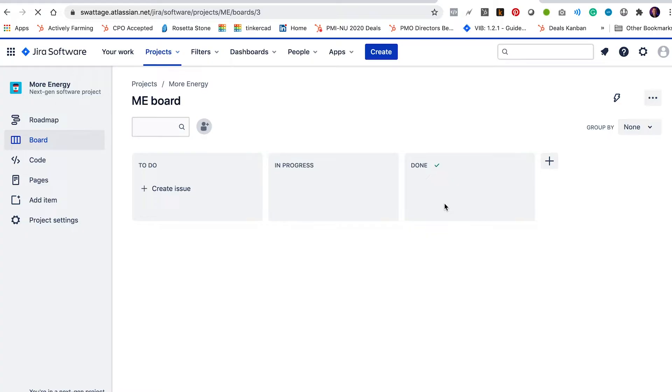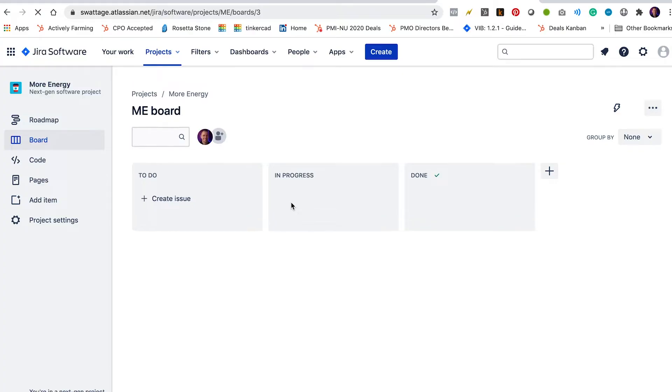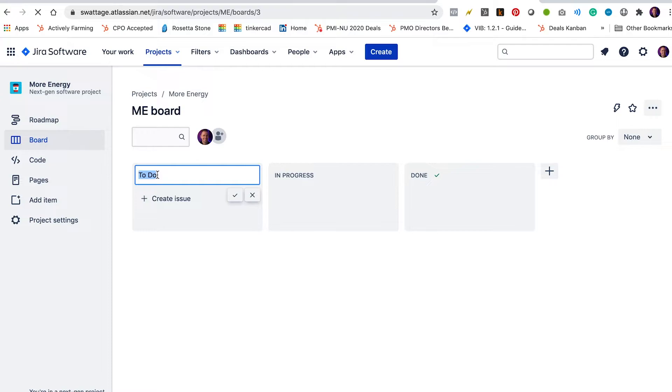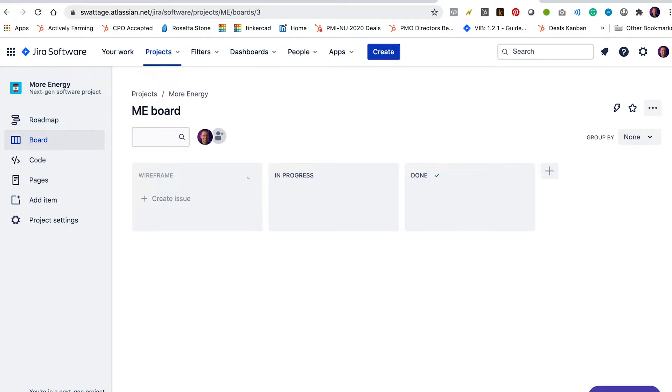We're going to change this up to create a very simple workflow for managing UX design and the interactions between the designer and the client. So what we're going to do is we're going to change to-do to wireframe. So that's going to be our first step. These are all of the user stories that are waiting for wireframes to be created. So we're going to put those in the wireframe column.